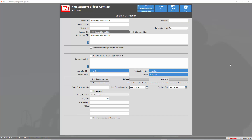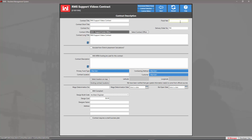Now that we're in the contract description view, every contract description will be different. In this case we should always fill out the fiscal year, the contract short title, the contract number, and the contract long title. We should also set the primary fund type along with the contracting method and customer. Down towards the bottom we want to make sure we have the wage determination number and the wage determination date.